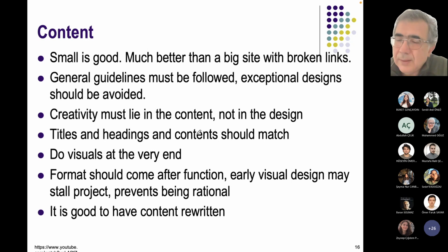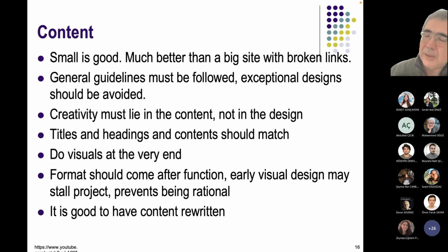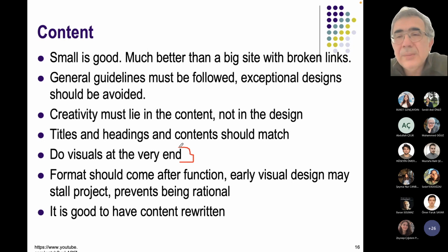So visual design and animations, if you do it, should be done at the very end, not at the beginning. So those are not important. Format should come after function. So early visual design stalls the project and prevents being rational about the project.